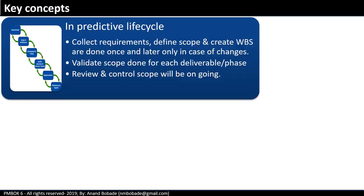Scope management is done differently in predictive and adaptive projects. In the predictive lifecycle, you collect requirements, define scope, and create the work breakdown structure — all done once, and later only in case of changes. Validate scope is done for each deliverable or phase, and review and control scope is an ongoing process.